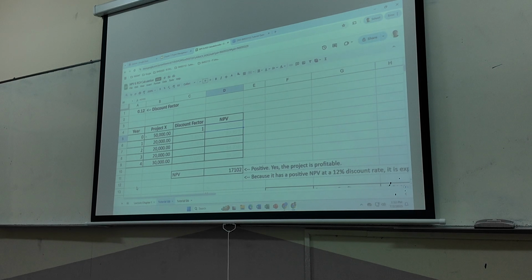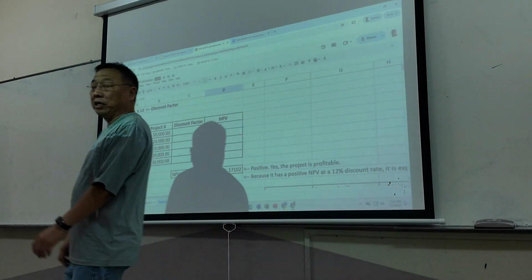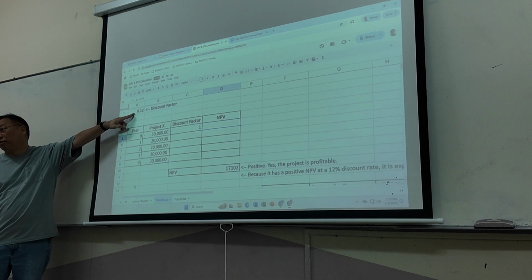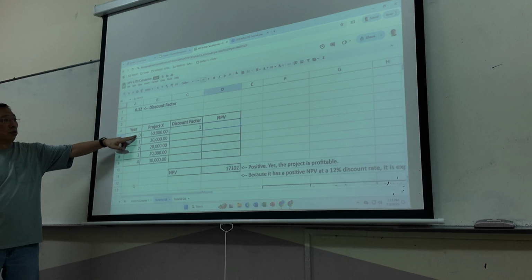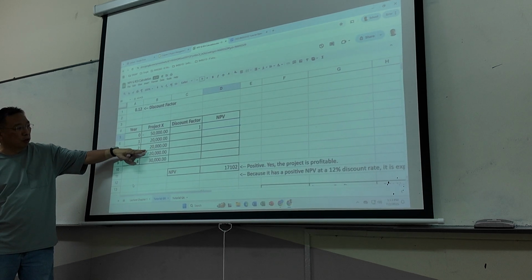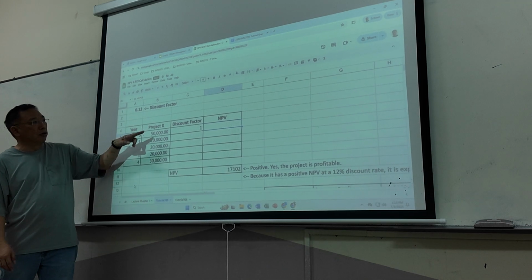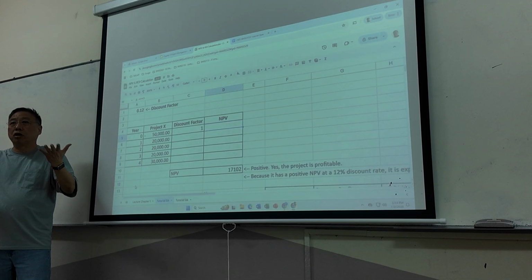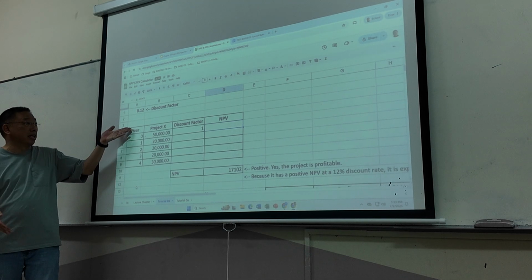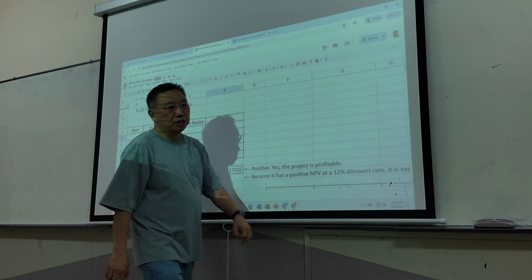Okay. So, what was the discount factor? 12%, right? So you convert it to 0.12, okay? So we follow exactly what they say. Year 0, negative, and positive, positive, positive, positive. So year 0, the discount factor is 1 because $100 today is $100 today. There's no change, right? In the same year, so you put discount factor as 1.